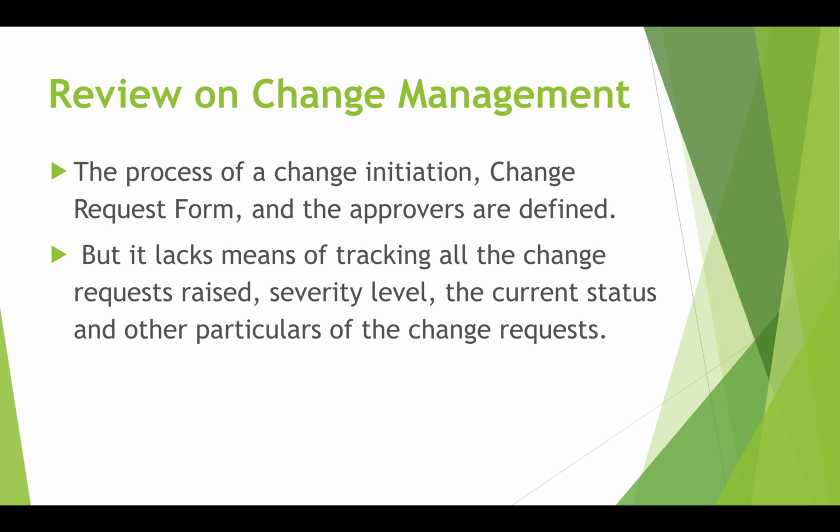Review on change management. The process of change initiation, a change request form, and the approvals are defined in the document, but it lacks the means of tracking all the change requests raised, their severity level, current status, and other particulars of the change request. It would also help in maintaining the different versions of project code or documents if we are able to keep track of all the change requests that were raised.